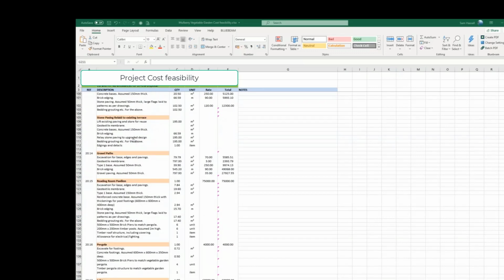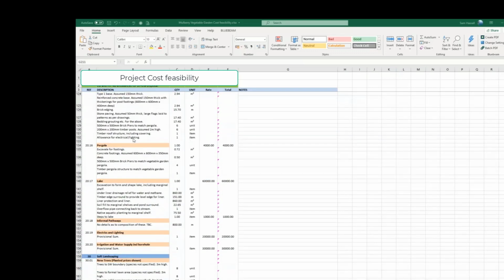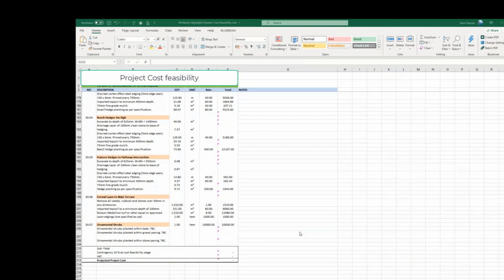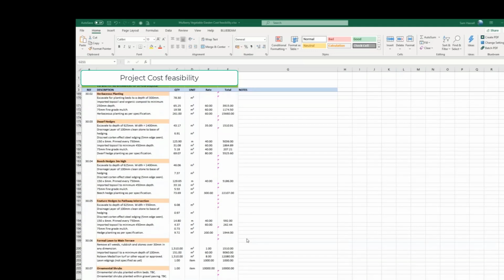And this is a second or third step, really. And this can be done pretty quickly when you get to a bottom line, which I've taken out here for confidentiality purposes, with contingencies, etc. And you're coming to a budget which you can then talk about, discuss, revise, etc. And once you've got that, you are free to get back to your drawing board and start your real design process, which evolves and evolves and evolves, as you know.